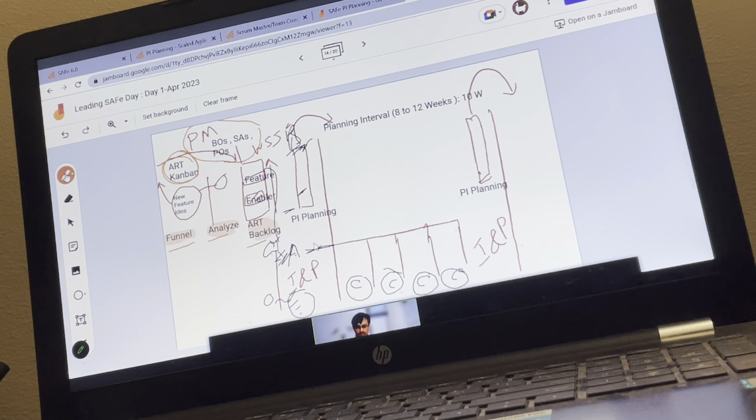Yeah, that's that one. Another thing, as we have learned, I think Ramya was talking about. These teams will take their PI objective to their area and populate their team backlog. We understand that now. So each team is preparing their team backlog here, and they will keep refining it in a weekly meeting. We call it team refinement, the backlog refinement session.